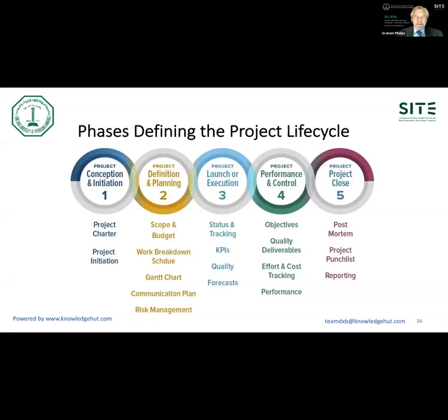Number 3, you launch. You need, of course, some form of tracking the success and the on-course elements of the project. KPIs will work for you, quality standards. You need to readapt forecasts. Very common on most projects is that you would put in a reforecast or report to senior managers on a regular basis, whether that's weekly or monthly or quarterly, depends on the project. But certainly you would need to keep that reporting going.